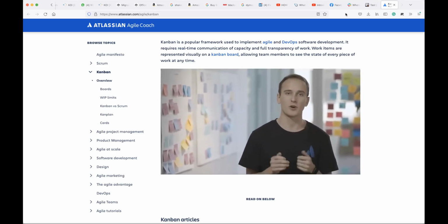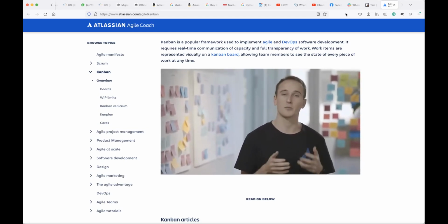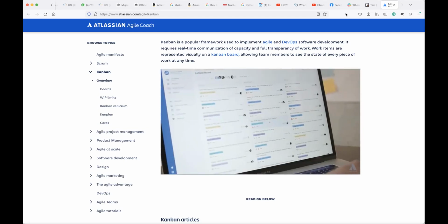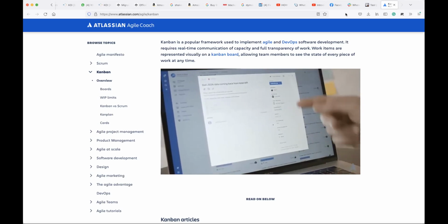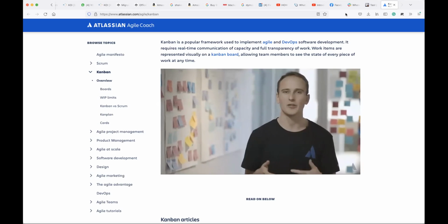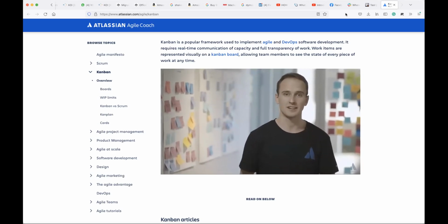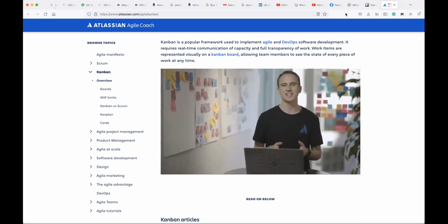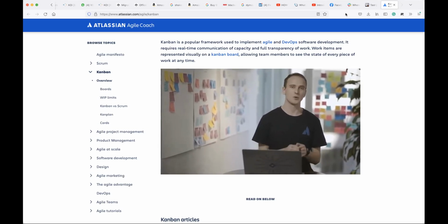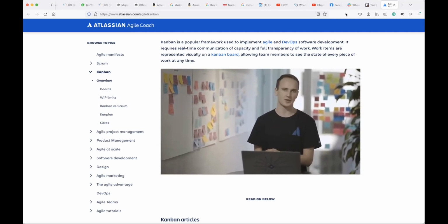You want to make cards for all the things you're working on and place them in the appropriate stage of the workflow. Kanban cards should have a title and a description and an owner. You can also add any other helpful information like a due date. Then your card should start to gain a little bit of a history as your team leaves updates on the card as it moves from one stage of the workflow to the other.